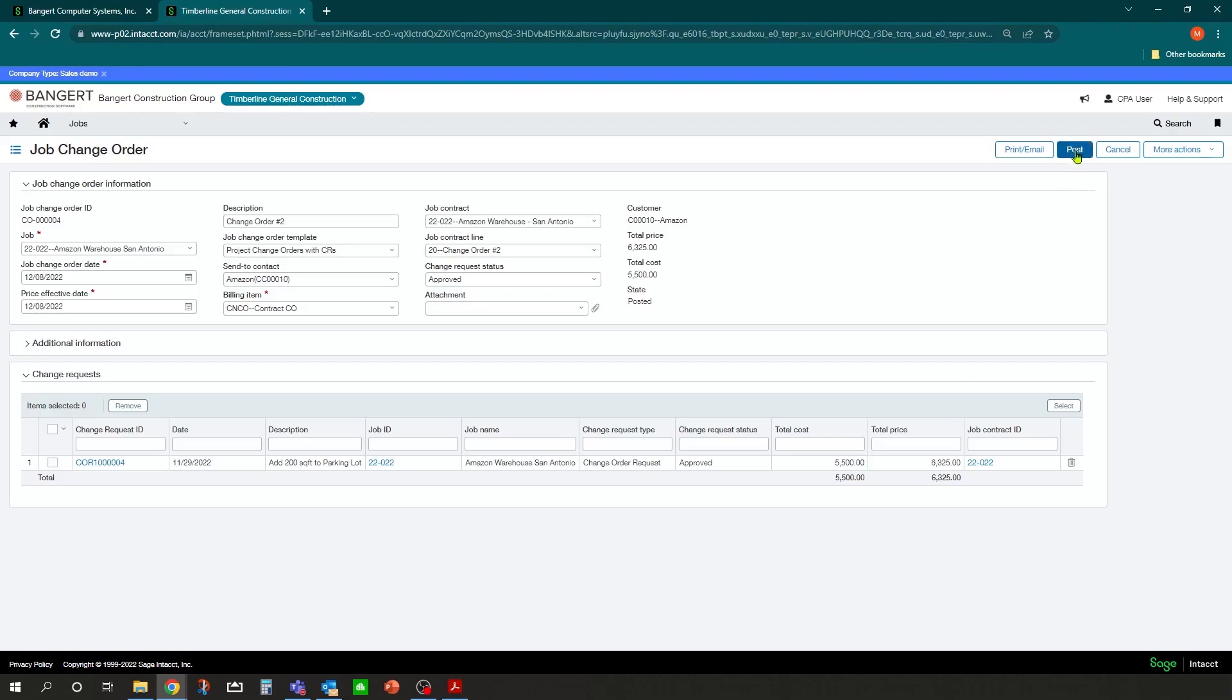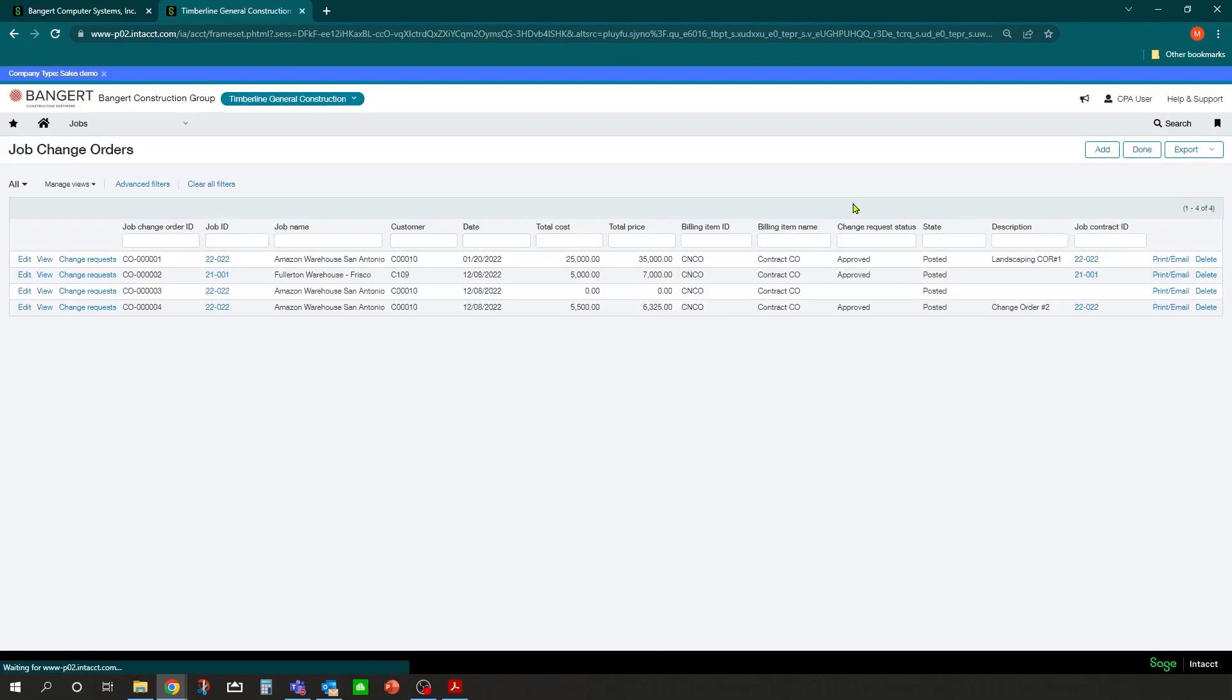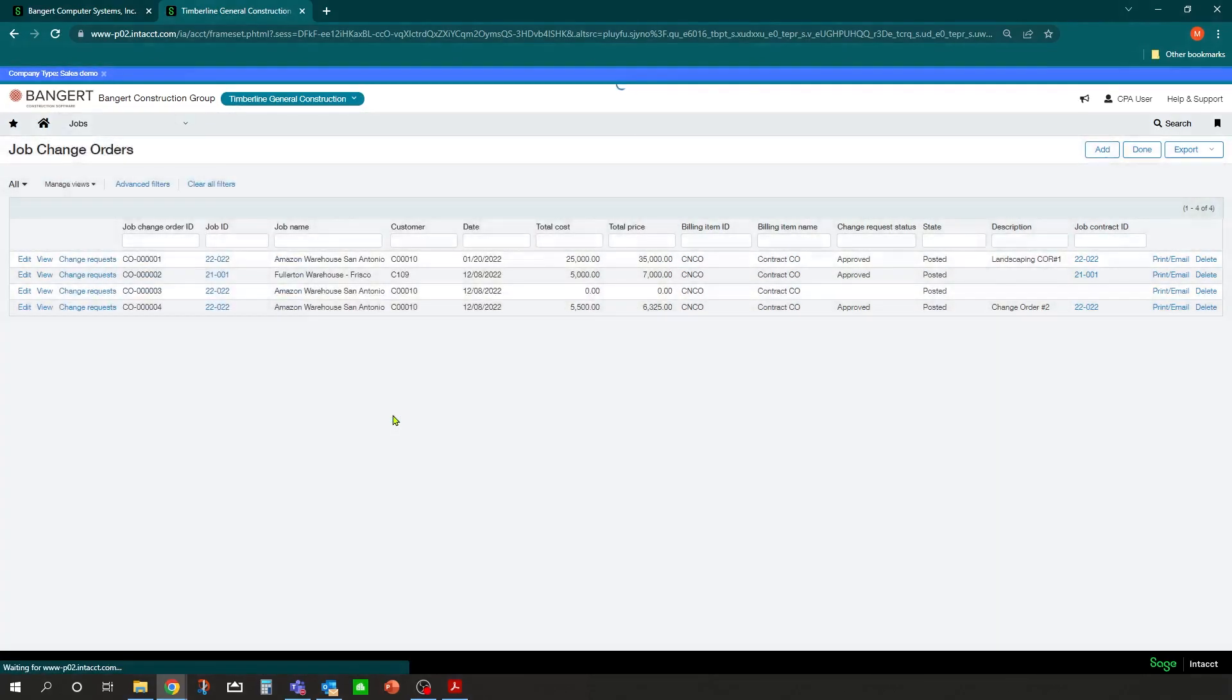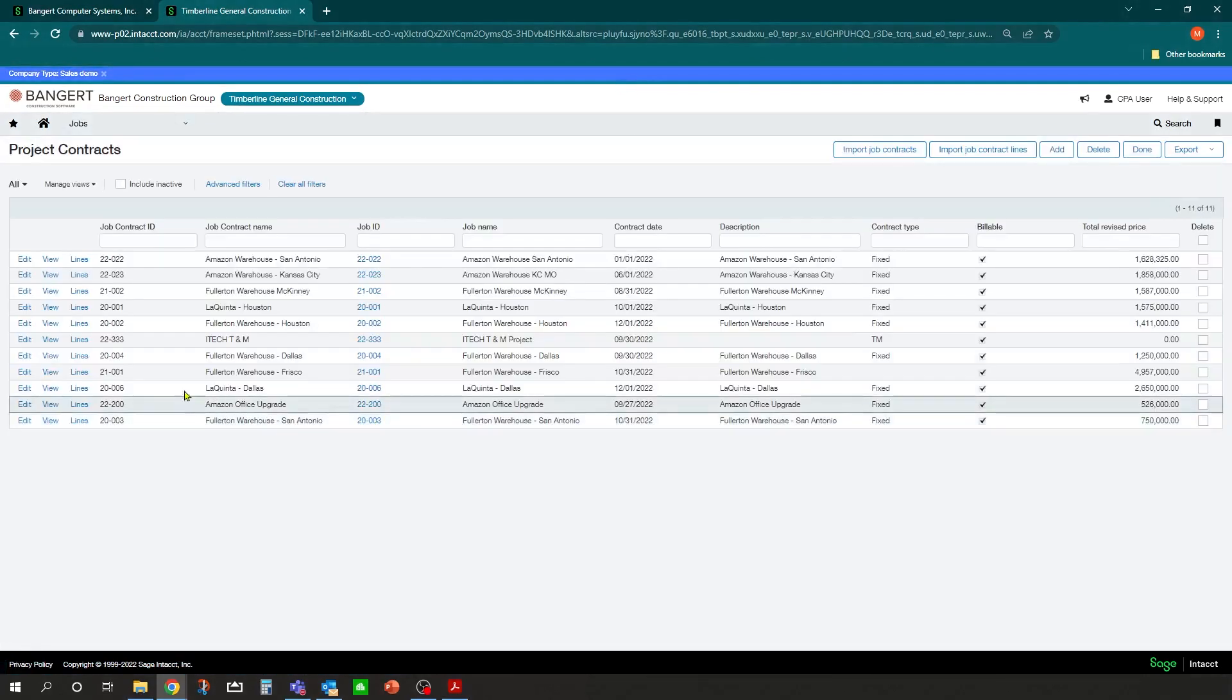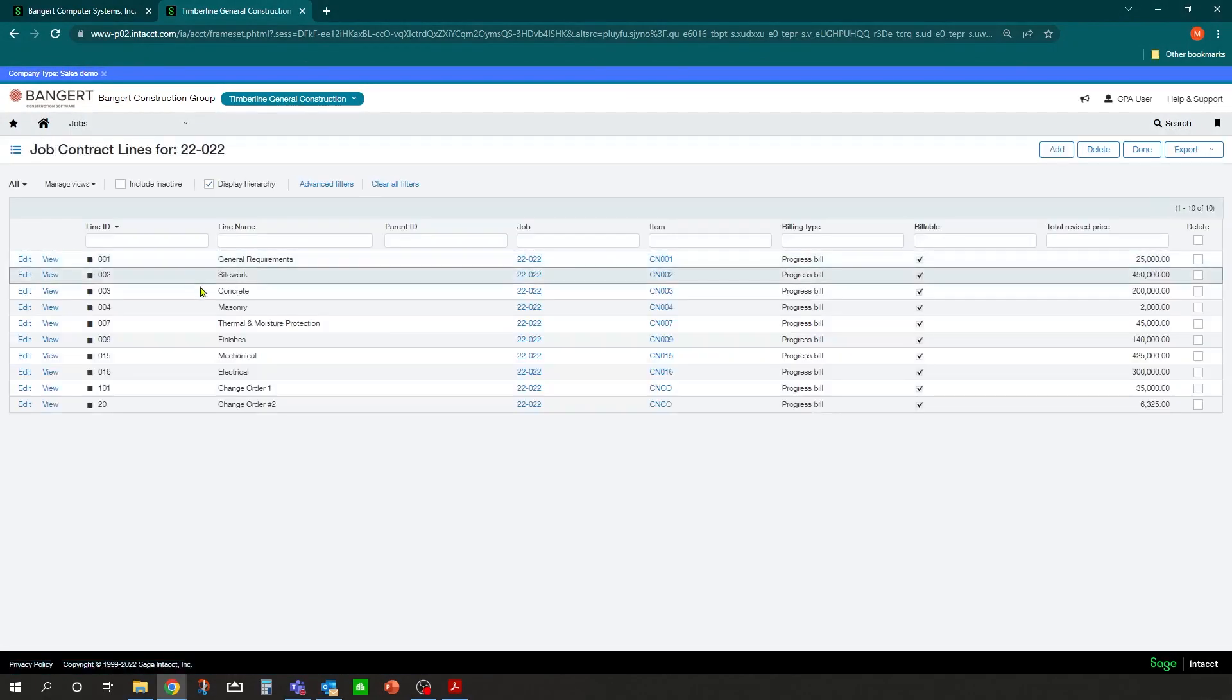I could then click post and this will update my contract values over in the job contract for that contract under lines. Now you'll notice change order 2 is only $6,300.25.